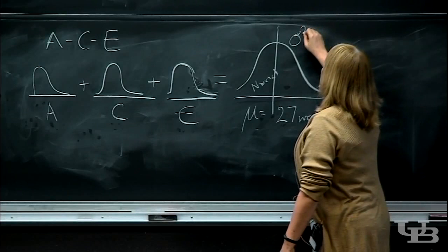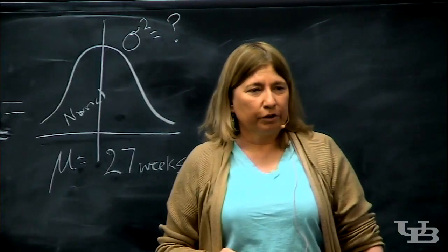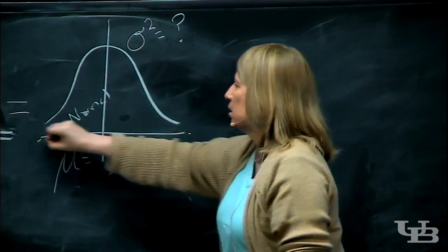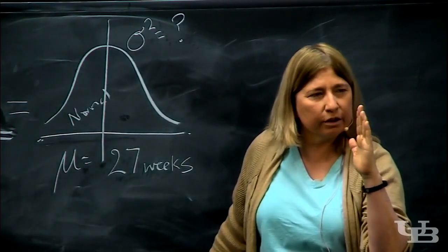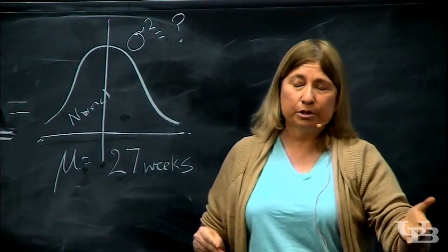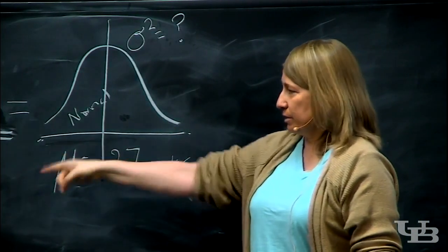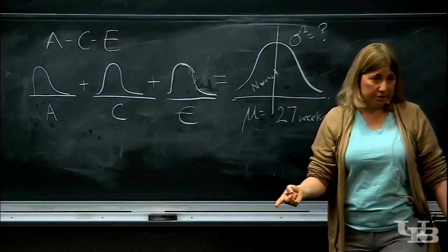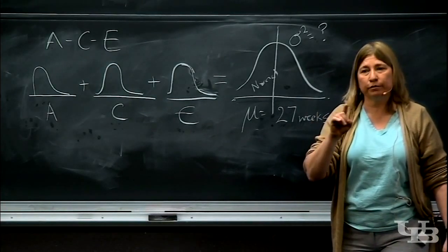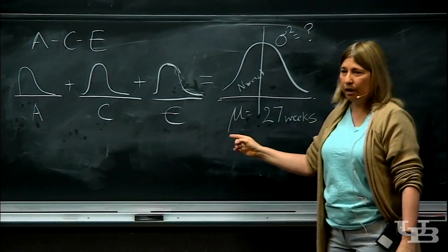At this point, what may be a little bit more mysterious is, where did I get the variance? I was telling you with confidence that the numerical expression for the degree of spread around that center is 3.96. Where did I get that? Here's a principle we just have to remember. Just as the expected length of the path is the sum of the expected lengths of the tasks, the variance in the path is the sum of the variances of the individual tasks on that path.